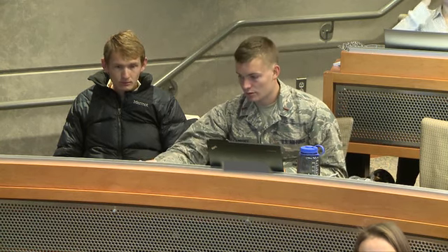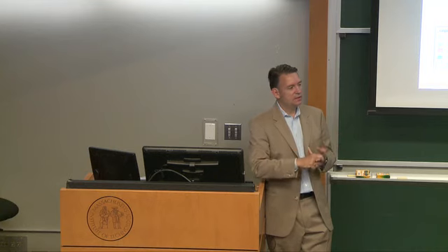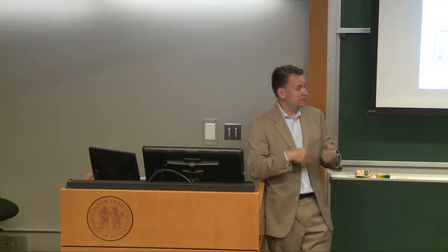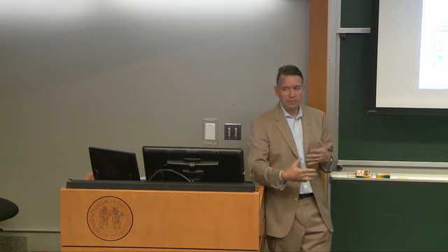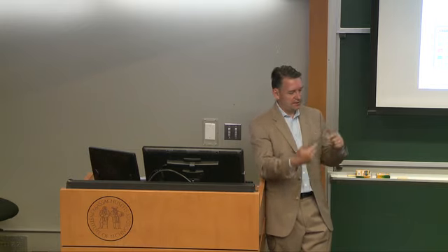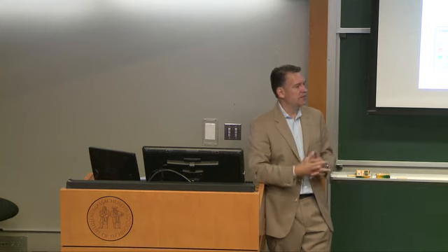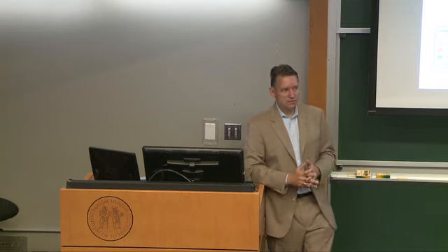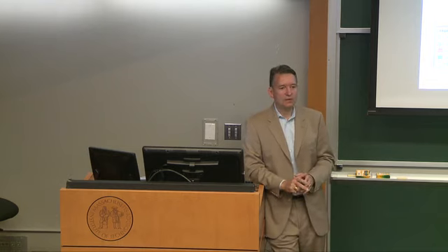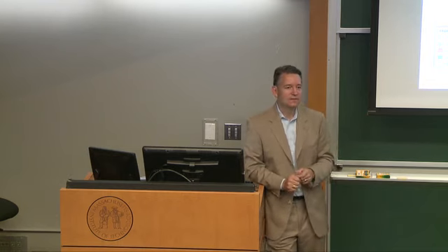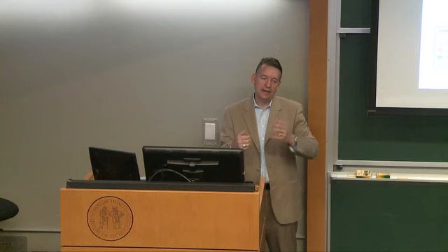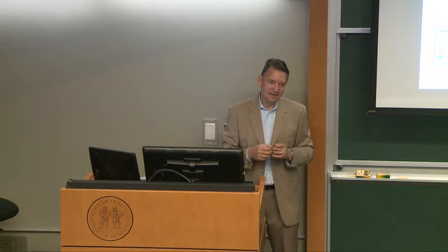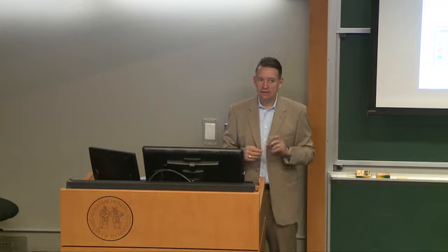Yes, so there's two things you mentioned. One is known as requirements volatility, right? The requirements are changing as you learn more about the problem. And then the other is you detect conflicts between requirements, and you have to clean those up. Those are two very valid issues, but it's not quite what I was going for. Yeah? There's another one, requirements creep, in which your customer levies new requirements on you once you've started the process. Yes, so new requirements get added. Hopefully you get more budget too. That doesn't always happen, right? So that's another issue. But it's a little different.